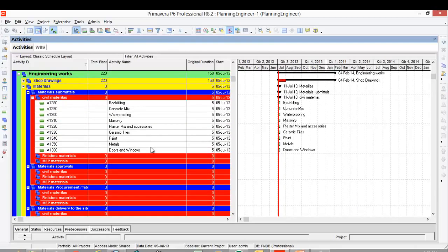I'll just start now, and tell you how to find the dates of these materials. Actually, I have a technique for these materials, and I prefer to make it backward and then give it to the procurement department to confirm the dates.